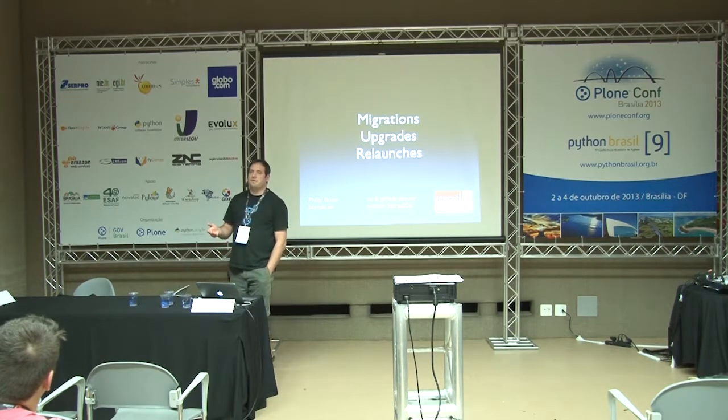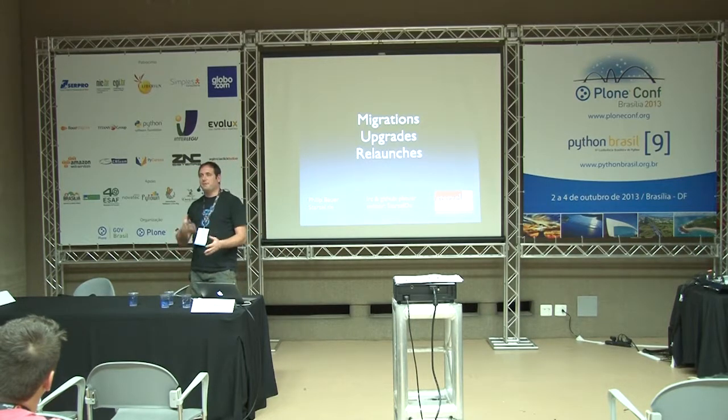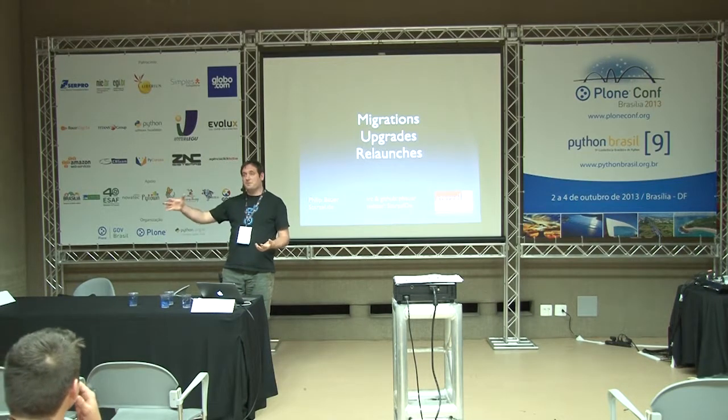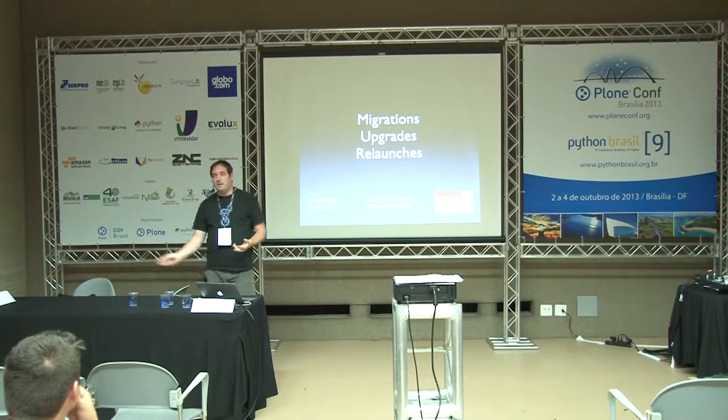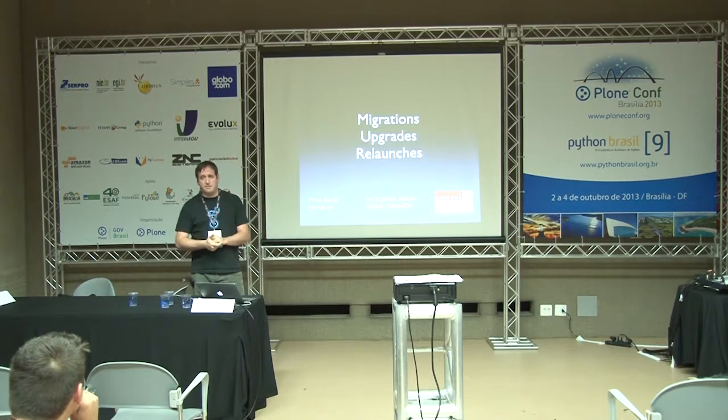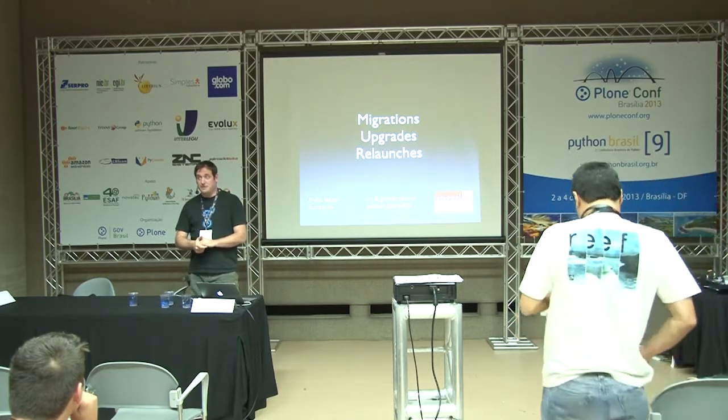before you start using Transmogrifier, which I think is a really powerful tool, but not easy to set up. So for a budget project, that might ruin your calculation. Maybe FunnelWeb, just parse the old page and have it create new content. There are several tools that do that. One is FunnelWeb, I think. But maybe other people have other opinions on that.